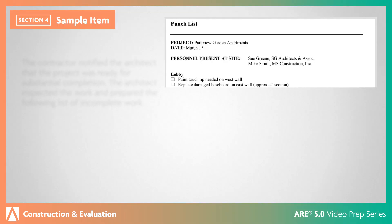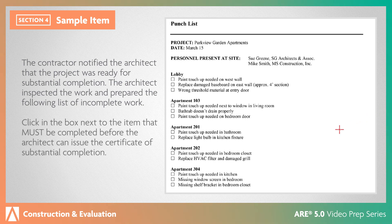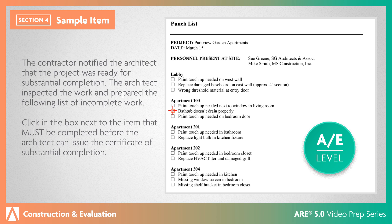Let's look at a sample question. The contractor notified the architect that the project was ready for substantial completion. The architect inspected the work and prepared a list of incomplete work. Click in the box next to the item that must be completed before the architect can issue the certificate of substantial completion. According to the Project Resource Manual, CSI Manual of Practice, reaching substantial completion does not mean all the work is completed. However, any remaining work must not prevent the owner's use of the building. The only item on this punch list that prevents full use of the building is the bathtub that doesn't drain properly. This AE-level item requires you to evaluate a typical construction procedure and determine the outcome.